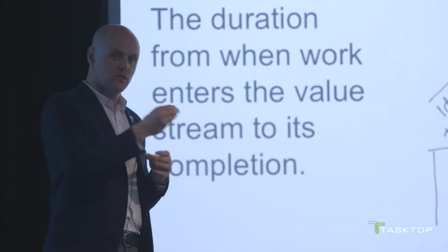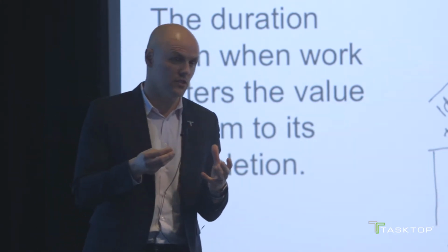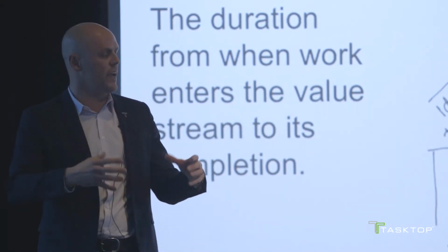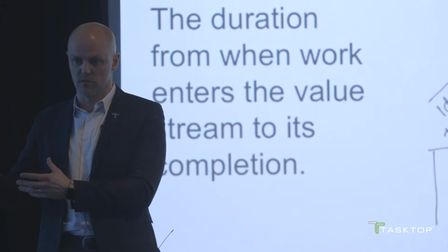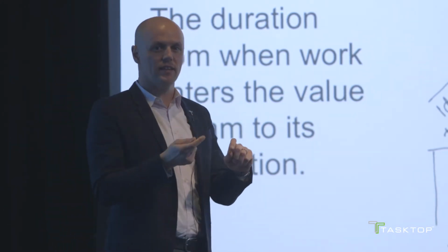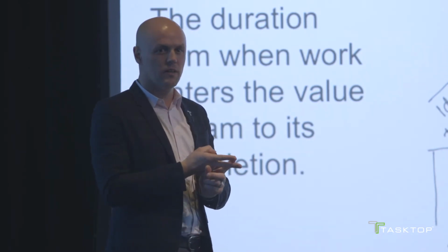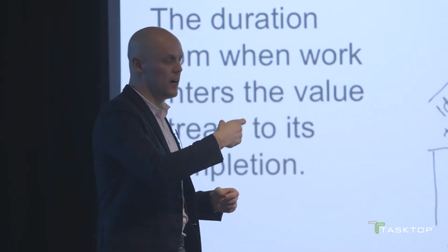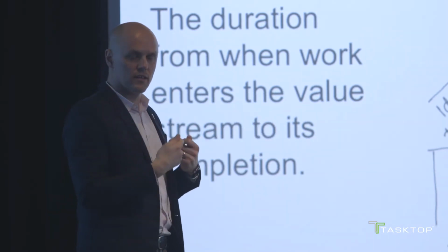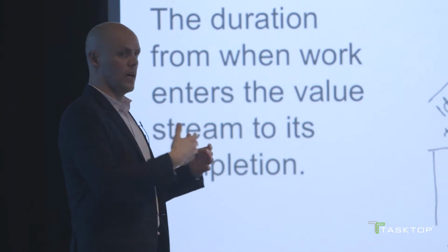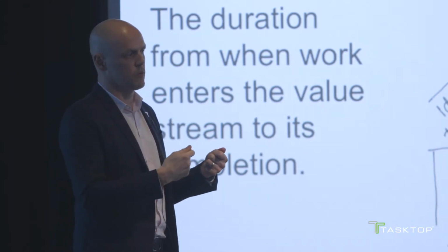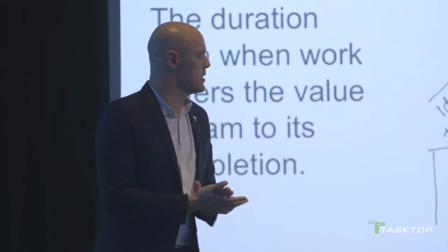So Dominica introduced this metric actually from the manufacturing literature, which is, again, flow time. And this is the one we think is most meaningful. Of course, you'll care if you have many things on your backlog, of your lead time backlog, that you haven't started, but we've realized that we've got to stop having a debate around what flow time and cycle time are. Cycle time's the small thing from stage to stage. Lead time's the end-to-end thing. And the most important thing we've learned is to measure flow time from when you decide to start the work, it enters your value stream, to when you finish, because that will be your predictive performance, much the way lead time is in manufacturing today.